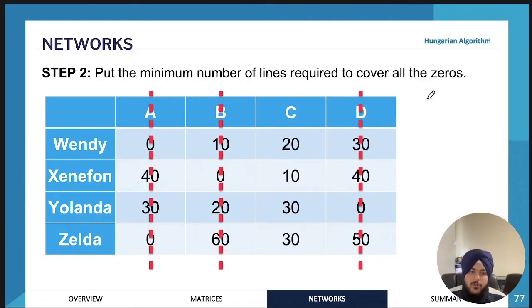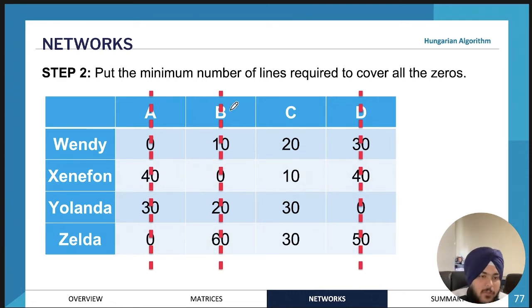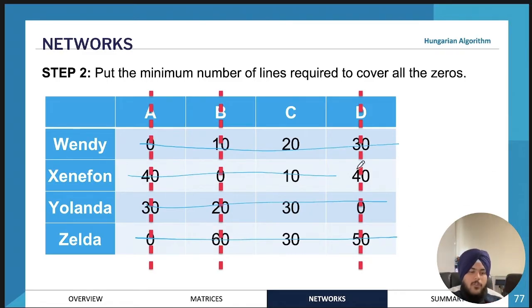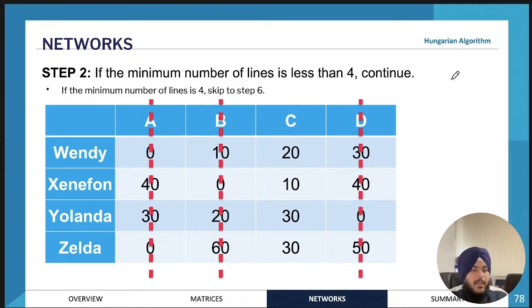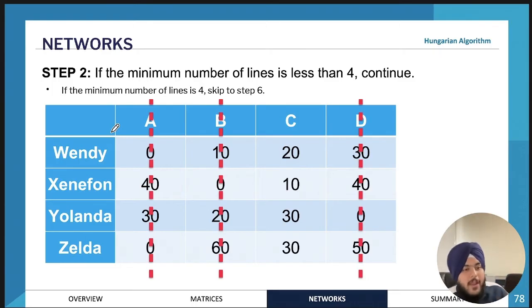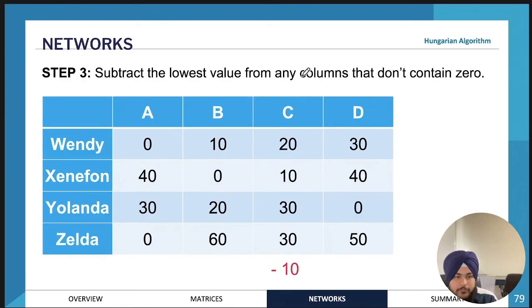Step two is to draw the minimum number of lines required to cover all the zeros. You must use the fewest lines possible — for instance, one line can cover two zeros at once, so don't use more lines than necessary. Once you've drawn the lines, if the number of lines is less than four (since we have four people and four tasks), continue to step three. If it equals four, you can skip to step six.